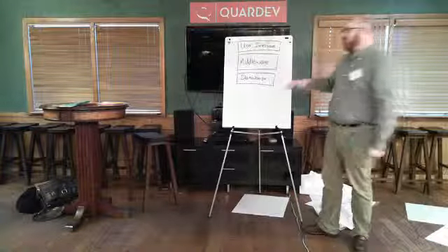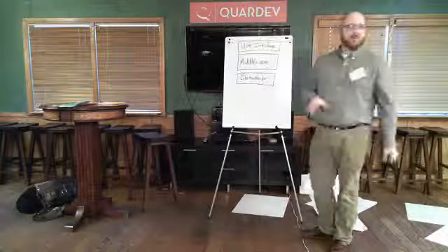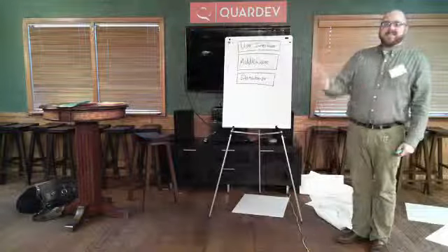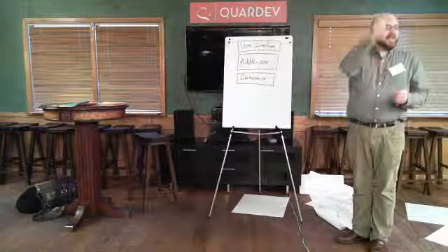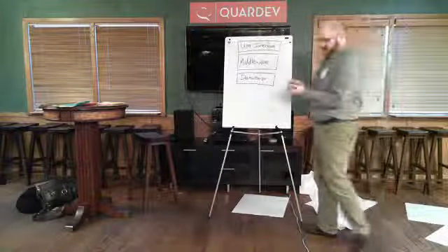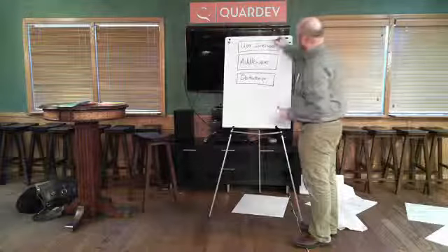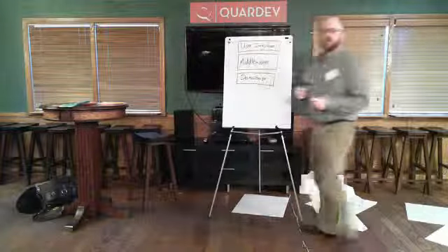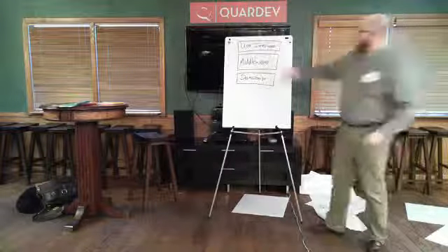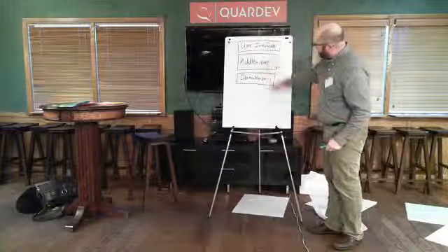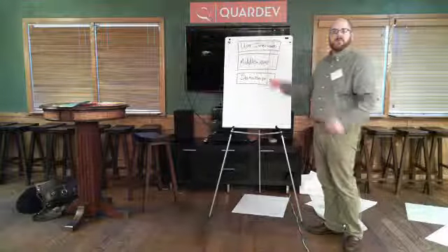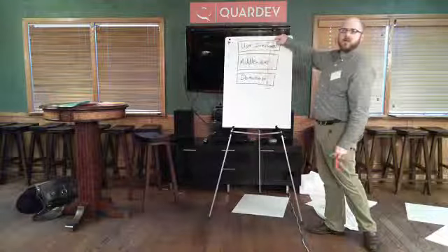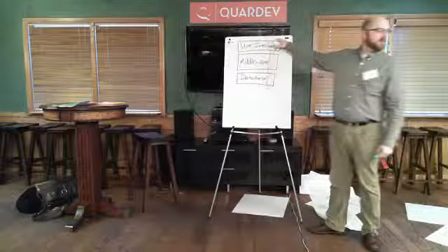I'm fond of the metaphor that software development is exactly not like building a house, because things can be changed. I can build a tiny slice, and that's what we want to see here. A little bit of user interface, a little bit of middleware, and a little bit of database, so that I can test this pass through the system. So before I build out the rest of the system, I want to see it in a way that somebody can verify, ideally my product owner.